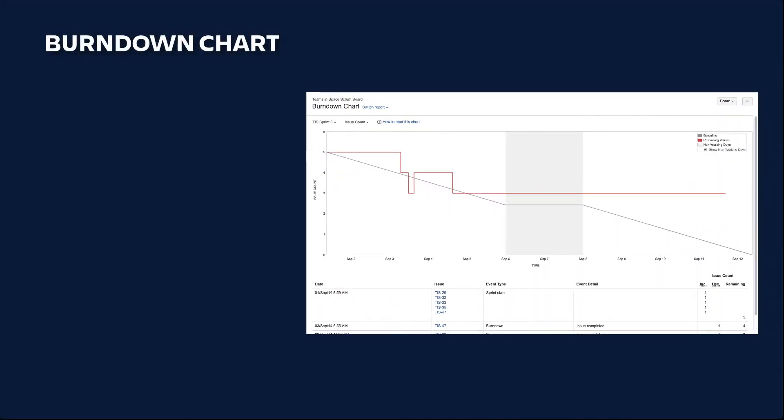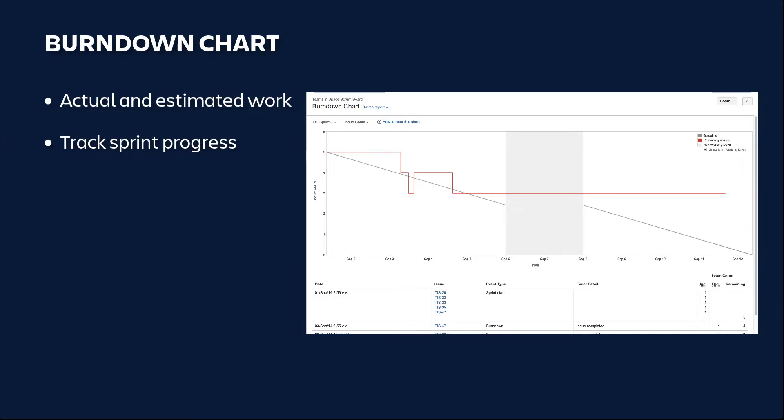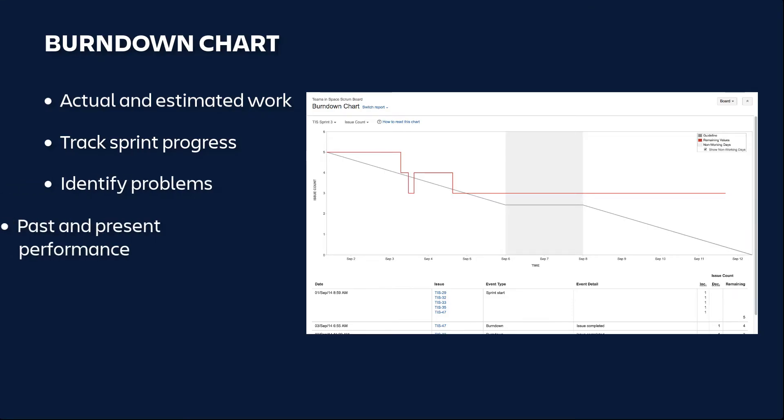A burndown chart is a diagram of the actual and estimated amount of work to be done in a sprint, enabling you to track sprint progress and identify problems. It only shows past and present performance, and not forecasting.